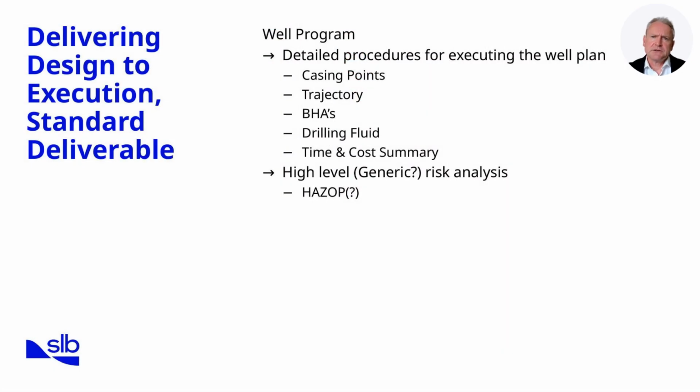Delivering a design into execution requires structured documentation, and that's where the well program comes in. A well program is the master document that translates design into step-by-step procedures. It contains casing points, trajectory details, bottom hole assemblies, fluid design, and a full time and cost summary. These elements ensure everyone involved has a shared reference.